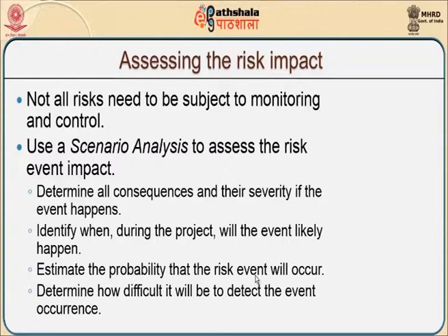We may have to apply scenario analysis to analyze the risk event impact. That means we have to determine all the consequences and the severity if the event happens. We have to identify when, during the project, the event is likely to happen. Not just that, we will estimate the probability that the risk event will occur. Finally, we will determine how difficult it will be to detect the event occurrence.